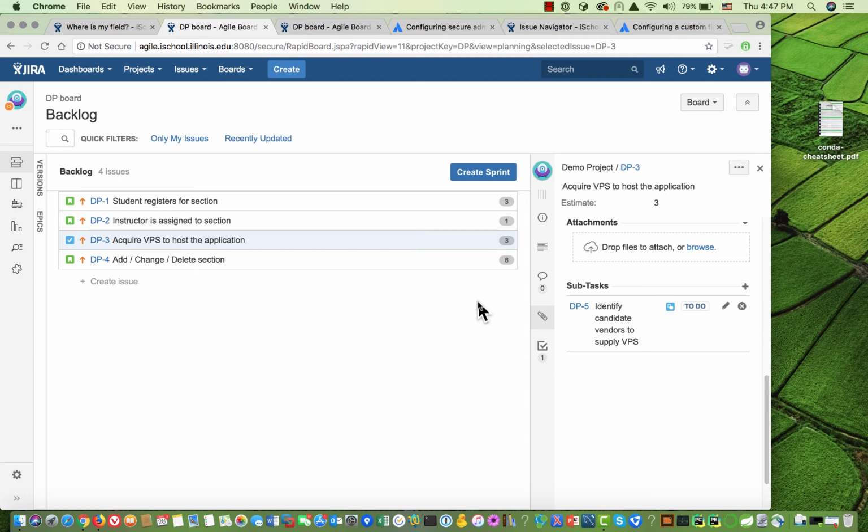And the task as well. If you have a bug, if you create a bug issue and you associate it with either a task or a story, what's implicit there is it's part of the work for the task or the story, but it's a piece of information that you want to track separately because you want to make sure that you report the bug and you fix the bug. By default, bugs do not get story points.